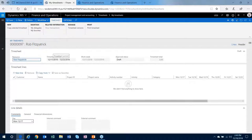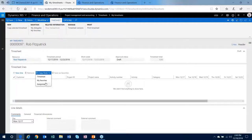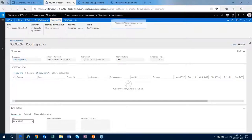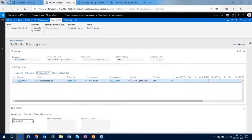What you'll need to know is the timesheet period. Essentially what you have the ability to do here is copy into your timesheet lines from your assignments. So what the system will do is it will read based on the timesheet period if you have any assignments assigned to you in work breakdown structures. It will give you the ability to copy those directly into your timesheet.